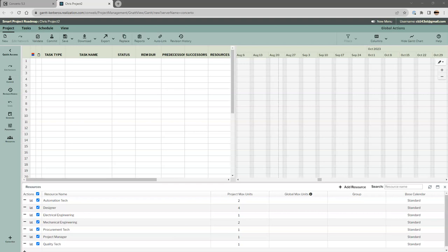So in general, the project team that we might have a brainstorming session with, or creating a project plan together, should understand this two-tier approach. It's quite simple. We're going to identify larger blocks of work that will be used to contain, as kind of small containers, many tasks, and that could be cross-functional tasks, but really those tasks necessary to get that block of work completed. And how do we control the release of those blocks of work into execution to help focus capacity?